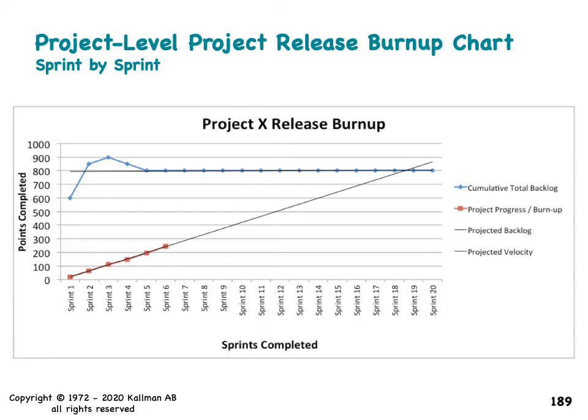Personally, I think that's extra overhead that's not necessary, because the problem is that the executives tend to be over optimistic, and if you give them the most likely date, the best case, and the worst case, they're going to go to best case, and then all of a sudden you're getting pulled towards a delivery date that might or might not actually be achievable. And so I don't like doing that. I think this is more transparent and more real.